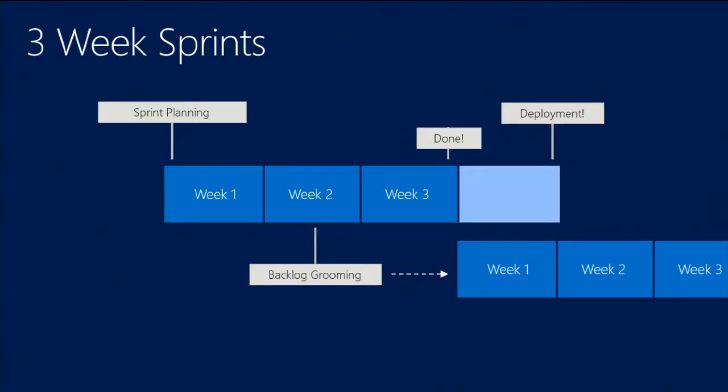I won't go into all the details, but it involves standing up what we call a pre-production environment, doing some final validation testing, final sign-off. And this is when we write all of our release notes and documentation, get that all up on the service, and do those coordination activities. So it doesn't take away from the team. There's a smaller group of people involved in this.